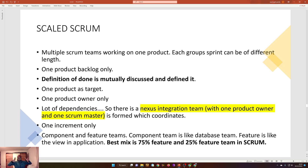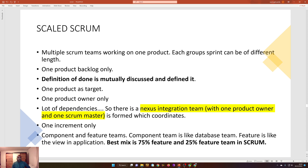There are different scrum teams and different groups of people, all sprinting, with each sprint potentially a different length in a scaled scrum aimed at developing one product — for example, implementing a big data warehouse for the whole company, with different applications and databases all merging into one data mart. In scaled scrum: there is only one product backlog, the definition of done is mutually discussed and defined, there is one product as the target, one product owner, and one scrum master.